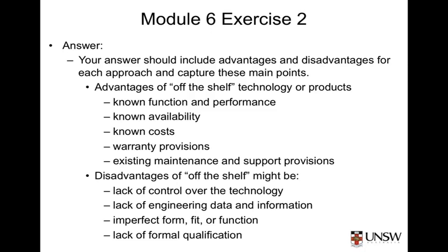Off-the-shelf technology will also tend to be available with known lead times, or, in fact, immediately available, hence the term off-the-shelf. The costs associated with off-the-shelf technology will also be known. Off-the-shelf technology will probably come with some form of warranty provision, so if it breaks or fails, it can be replaced. And off-the-shelf technology probably also has maintenance and support provisions in place so that we don't have to worry about maintenance, spares, test equipment, training, and so on.